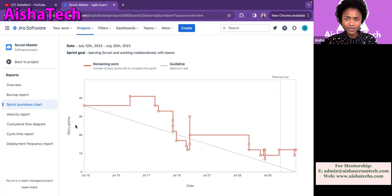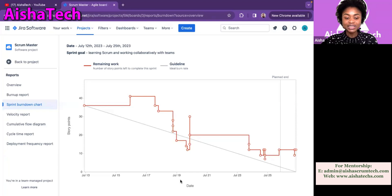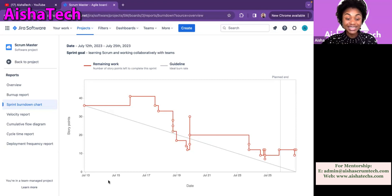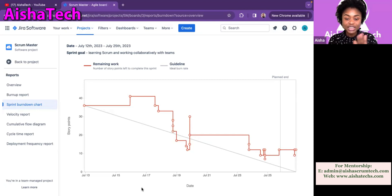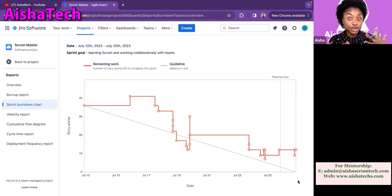The next thing I'm going to look at is how long the sprint is. I look at the bottom, look at the dates, and I can already tell — I see the sprint length. This might be roughly a one-week sprint or two-week sprint, and you can tell by the dates because two-week sprint is 10 days. Looking at this, I can already tell this is a two-week sprint.